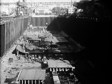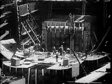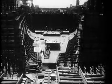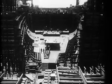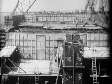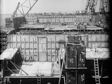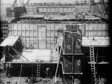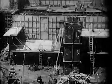There was the inner bottom and the big after gasoline tank. They started amidships and kept building up like a big pyramid, adding structures fore and aft from the midsection, adding one deck level above the next, 11 decks in all, up to the flight deck. Then they added more compartments forward and compartments further astern until her hull began to fill out and take its final shape.